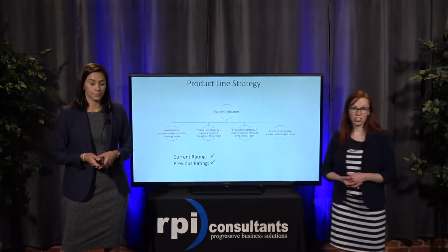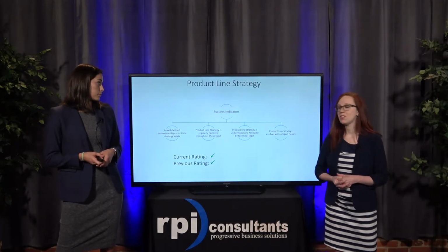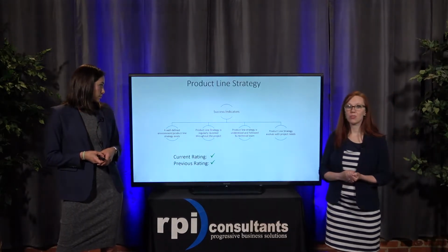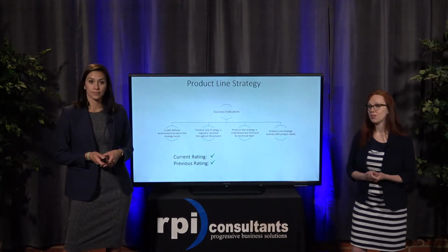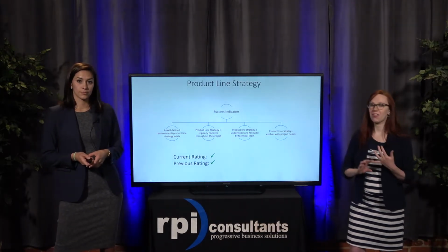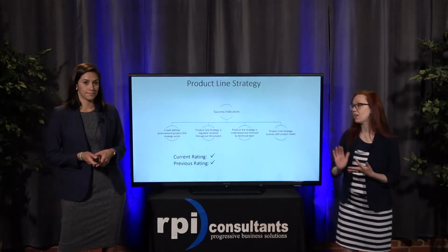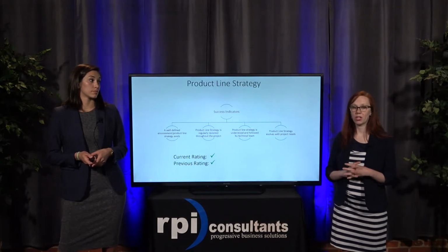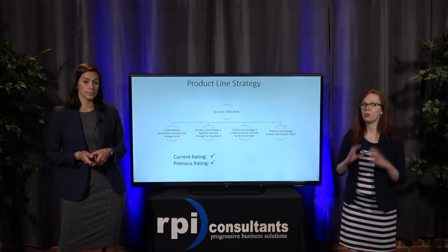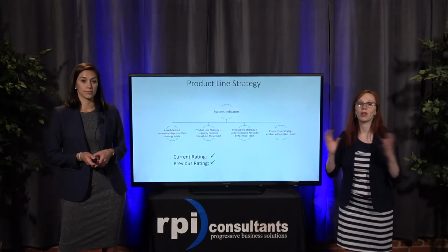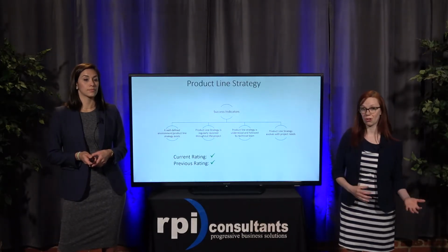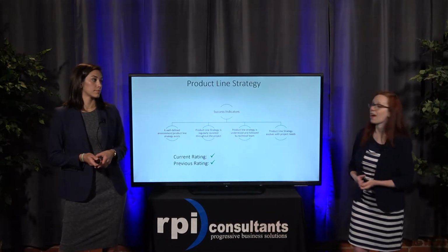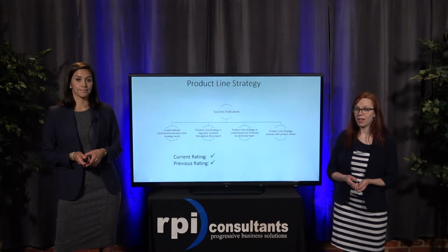One of the very first tasks that we do when we go into any implementation is develop a product line strategy. This is really a crucial key to the whole implementation. It affects your testing plan, your training plan, your entire implementation. This is the piece that outlines which environment you're going to do each piece of the project, where you're building, where you're testing, where your data conversion starts. Any good implementation will have a very clearly defined product line strategy.